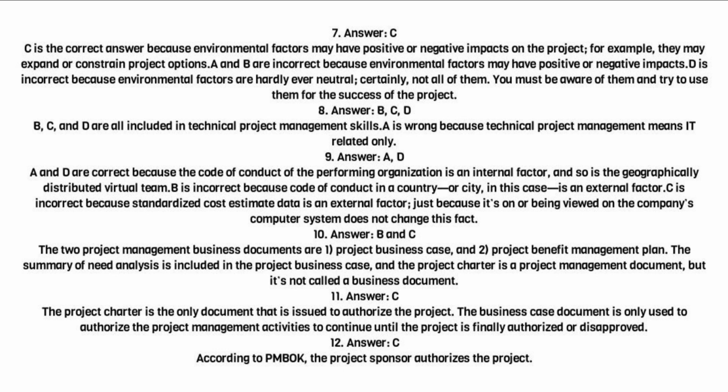11. Answer C. The project charter is the only document that is issued to authorize the project. The business case document is only used to authorize the project management activities to continue until the project is finally authorized or disapproved. 12. Answer C. According to PMBOK, the project sponsor authorizes the project.